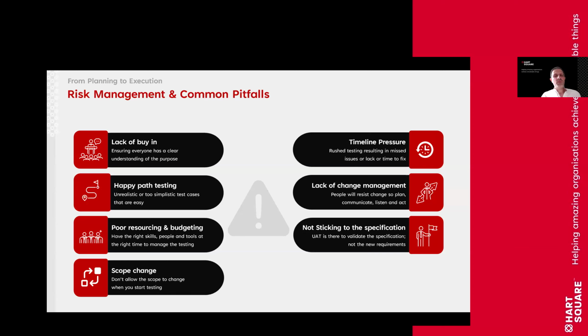That's valid, but it doesn't mean it's a bug. And so the best thing you can do there is define that as a change, not a bug. If it is clearly something that's new, that wasn't identified, it's best to acknowledge it as a new requirement, go down the change control process rather than introducing it as a bug, because it will cause friction, it will create issues, and it won't get addressed in a timely manner.